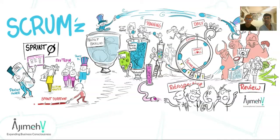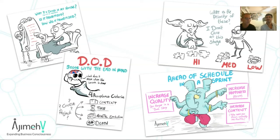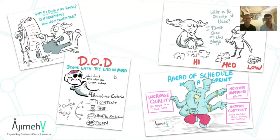Here are several things you need to be aware of as an advanced Scrum Master — and we're not even talking about which level yet. One is to not fall into Parkinson's Law — not letting tasks or user stories expand with a lot of waste. We want a clear definition of done: to know what we are working on and what points make a user story done.